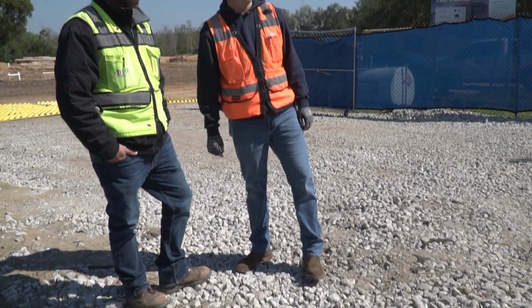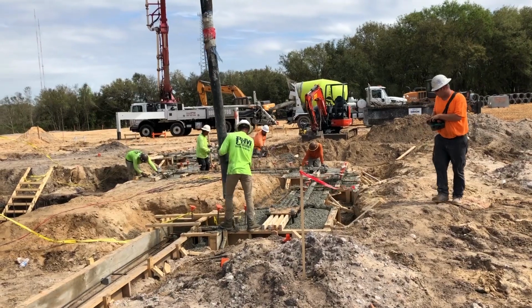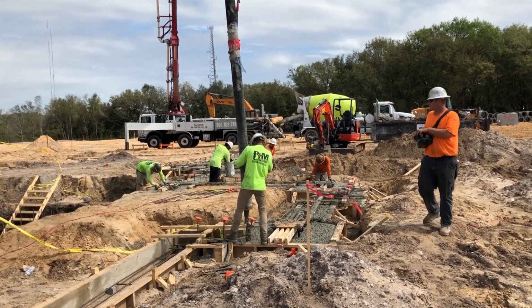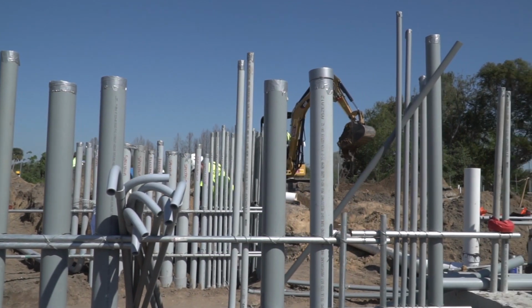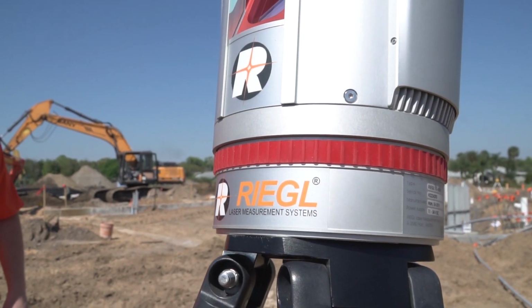I called up the superintendent, sent him an email, and was like, hey, we got some issues. So we met 7 a.m. the morning before the pour was 11, went through, double checked what I had found, and sure enough, we had these 4 errors. So we got on the phone with Nevin. We're like, Nevin, we got issues, we got to stop the pour, we got to make these corrections before we pour, otherwise it's going to be a huge mistake on our part, and that's why we're doing all this. We're solving problems before we even knew that there were problems, and we're using the VZ400i to make this happen.